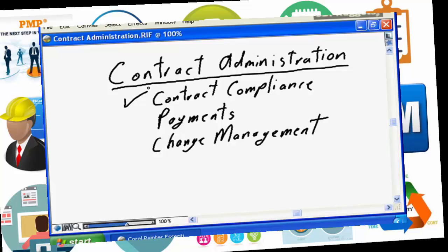And it was a very simple contract clause that basically stated the seller, that was me, was responsible for delivering a detailed status report to the buyer by every Tuesday at noon. Well, through personal relationship, we had changed that, and I was no longer delivering weekly status reports by Tuesday at noon. I was delivering bi-weekly status reports every Friday. But because the customer suddenly wanted to terminate the contract, they found this clause in the legalese in the contract that said we're in violation, and therefore they had rights to terminate with cause.